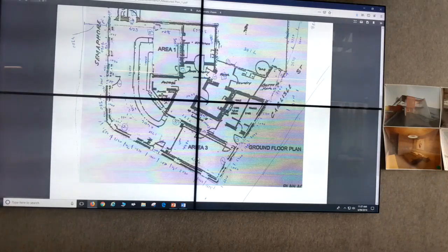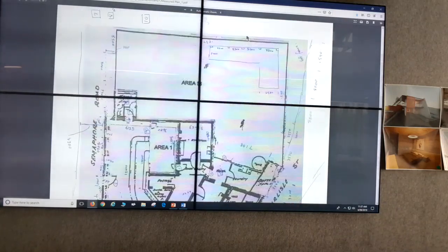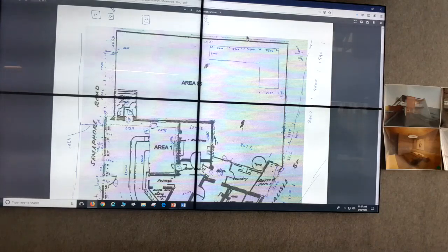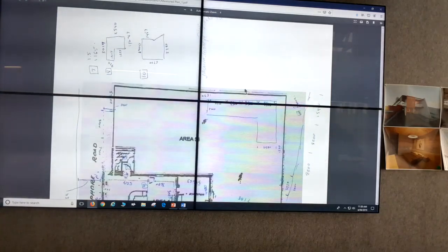I know it does make it a little bit difficult, but you've got some idea there, and you can also take an aerial shot of the whole area and work out from there potentially the square meter. Or you could just actually say, per square meter, I'm working at 3,000 for the materials to be used. And then you could work out a rough idea from there. Okay, all right. But that's not essential at this stage, okay? With other units that you're doing, yes, it is, but at this stage, no.